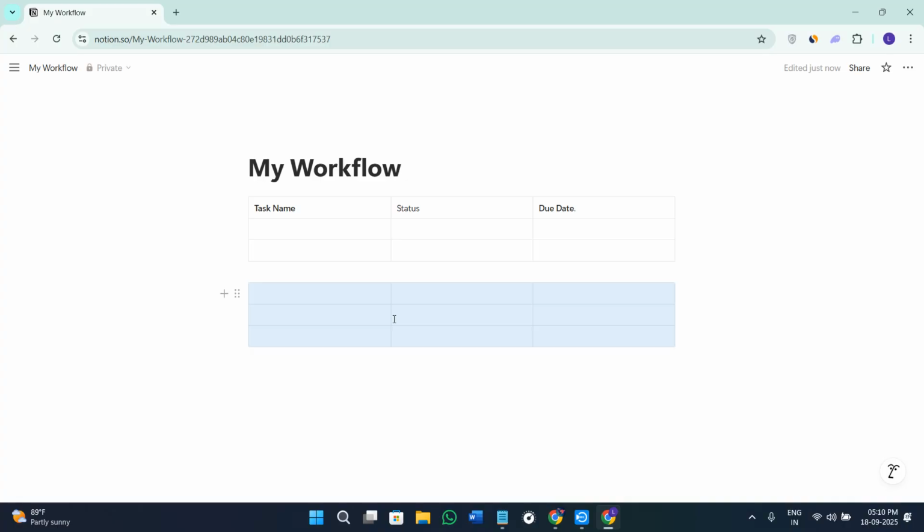After that, you can simply provide the tasks over here like I have given. Then in the rows, you can add the data. After that, you can change the view from the list to the board view, and you can use the drag and drop feature like we do in the Kanban in order to drag and drop all of your tasks from one section to another.